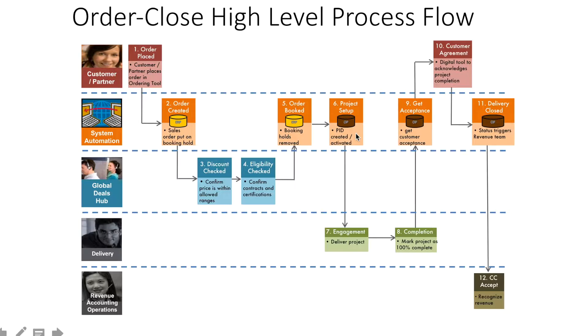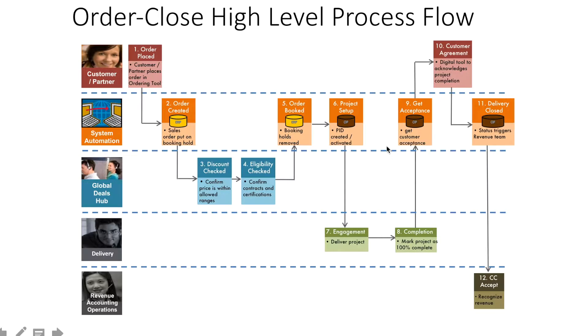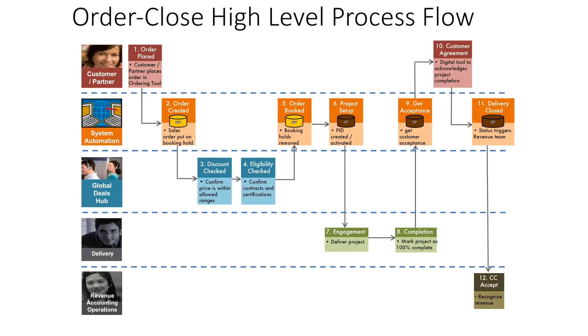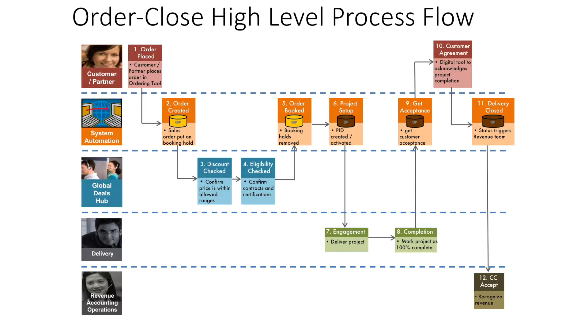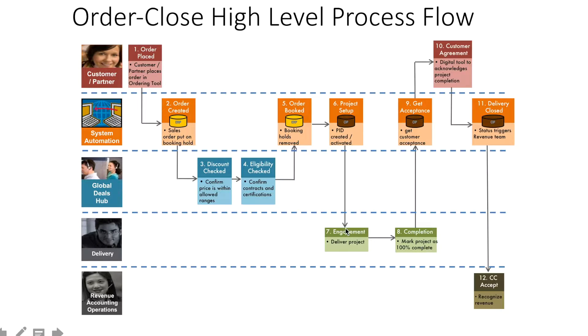The program manager identifies what skill sets are required for executing the project and creates a request for onboarding such resources. Each project management tool allows creating resourcing requests that are automatically triggered to work managers (delivery managers) who have resources with those technical skill sets. The program manager picks resources from work managers and composes a team. Now the program manager has technical resources, customer information, and sales representative information all set up.